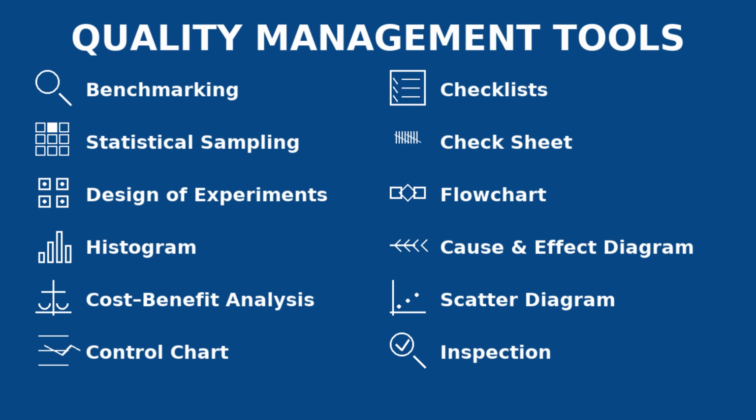You come across the first project manager. He is looking at the project practices of comparable projects. He is comparing different projects and he is comparing the practices of different projects. What is he doing? He is actually using the tool called benchmarking. Benchmarking refers to comparing project practices or metrics with industry-based standards to identify improved opportunities.